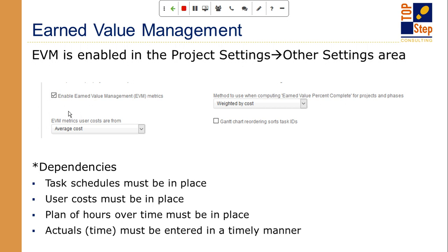So another thing to point out is that earned value management is very much a time-based calculation. So if you wanted to factor in things like the burning of expenses or maybe fixed fee contractors, that would drive you to actually build your own EVM calculations so that you can consider things like expenses and purchases and so forth.